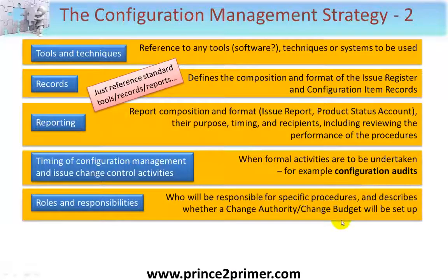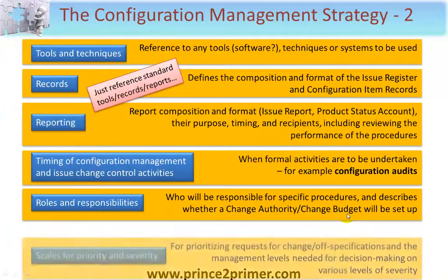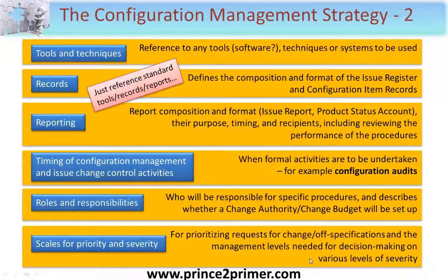Roles and responsibilities. Who will be responsible for specific procedures? This will describe also whether you're going to have a change authority rather than just the project board, and or a change budget to be used to pay for any changes. It's highly likely that this section would merely state that project support will be responsible for managing configuration management on behalf of the project, although it might be a central project office if that's the way your organisation has set this up. Scales for priority and severity.